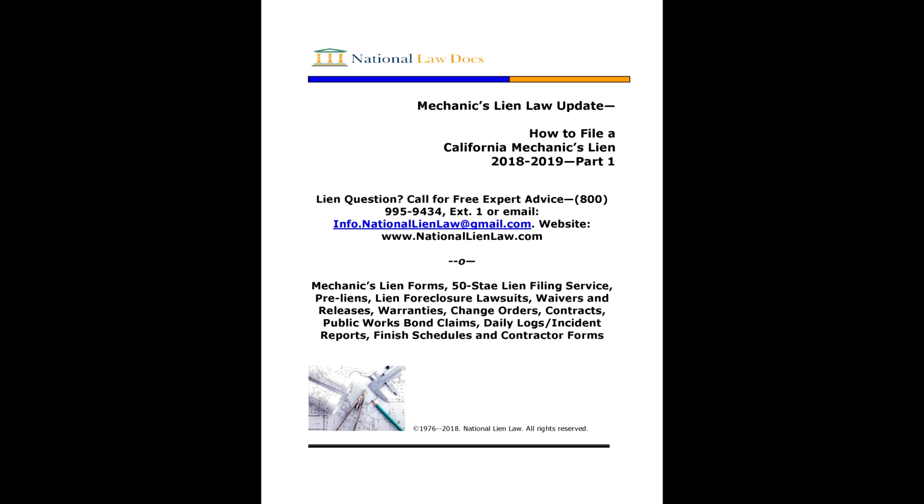is residential projects. The California Business and Professions Code requires, as a condition to file your lien, that you have a written home improvement contract, which has almost 21 separate provisions. But obviously it's a good idea to have all your contracts in writing anyway. Judges do not like oral contracts because of all the uncertainty. If you do have a written contract or purchase order, make sure both parties sign. National lien law has seen so many cases over the years where a signature is missing and therefore the written contract is no longer binding.